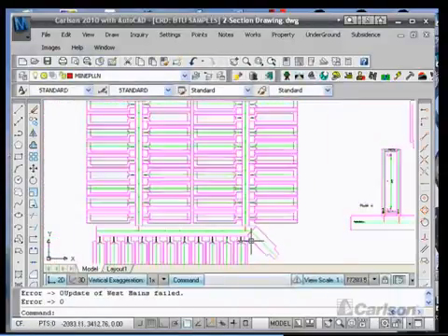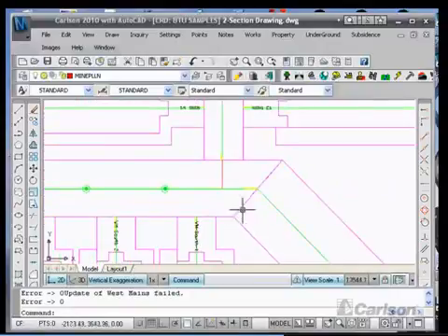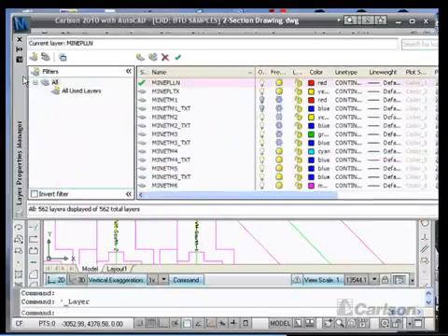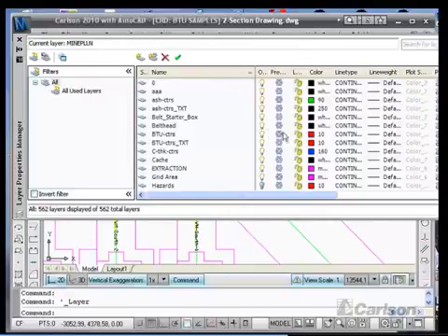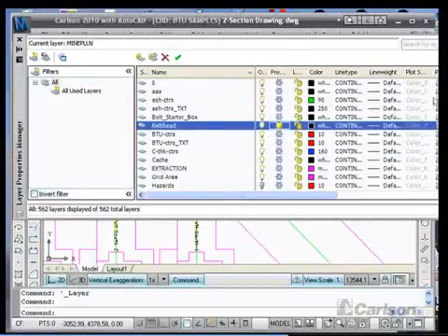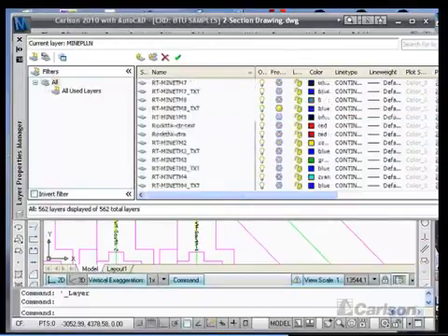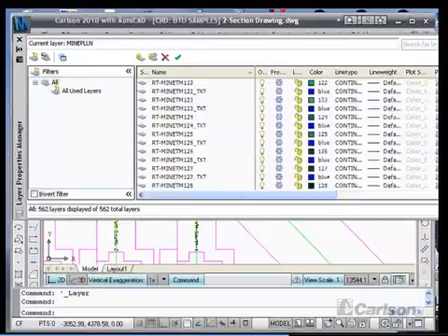In addition, we included drawing events in this area to represent the placement of belt heads and overcast ventilation controls for this particular area to show their impact on productivity. So in order to show you that, I will turn on the layers for the belt head and layers for the overcast.